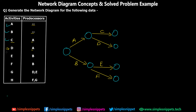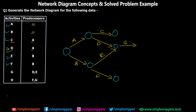We've completed A, B, C, D, E, and F. Now for G, two activities must be completed first: D and E. After D we reach one node, and after E we reach a different node — but we want one single event before starting G. So I'll erase and redraw: I'll connect D and E to one single event. Now I can draw G starting from that combined node, since G requires both D and E to have happened.